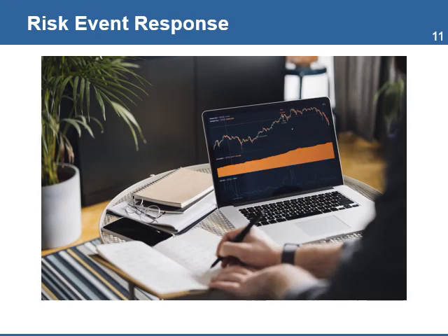Risk event response involves executing the risk contingency plan to respond to a risk event. Executing the plan ensures that the people assigned to those duties, the risk owners, carry out the actions to mitigate, prevent, or respond to a risk event. Preventive actions occur when you implement measures to reduce the impact or probability of a risk. In other cases, you can decide to implement the actions defined in the contingency plans and workarounds to respond to a risk event for which you did not have previous preventive actions.